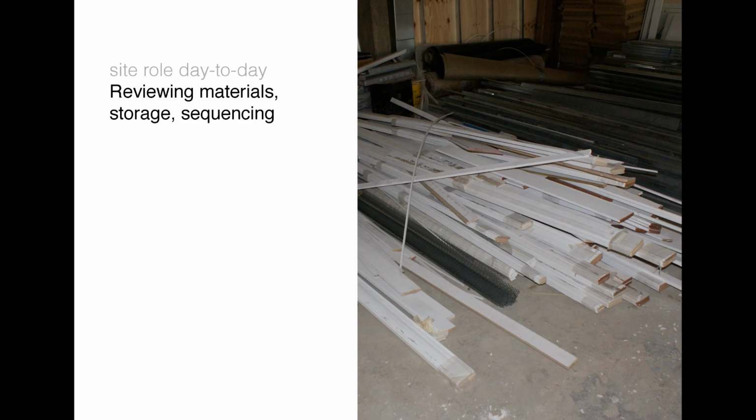So, day-to-day process. This is in no particular order really, but one of the things I do on a day-to-day basis is check how materials coming onto site are being received and how they're being stored. So this was some door frames for the Abercrombie building, obviously not particularly well stored there. And that subcontractor isn't working anymore for the project.